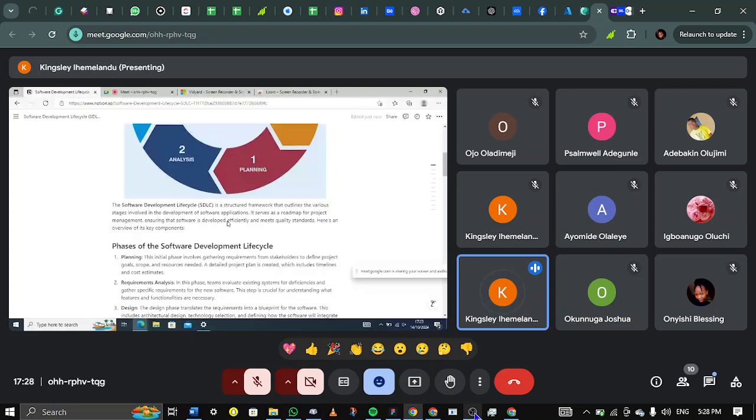Given the 6 months here, instead of building the whole application in the 6 months, what we are going to do is break it down into smaller tasks. Maybe for the application we know that it's going to need authentication. We know that it's going to need products, or maybe orders, right? So we break it down into these smaller tasks, and then we tackle each task.